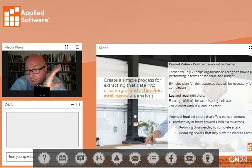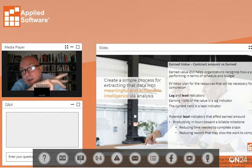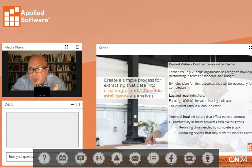What it doesn't solve, but it puts pressure on, is this idea of billing in increments at phases and milestones, right? So if I plan traditional milestones for schematic design, design development, construction documents, and so on, and then I'm pushing more of that up front, you'll see a bulge early in the project where I'm spending more hours than I can actually get value for, right? Now, part of that's an industry problem. That's something we've been talking about for a while, that we've got to change how we scope projects. But it's also a harder sell, I think, for the owners, unless there is value for them, right?